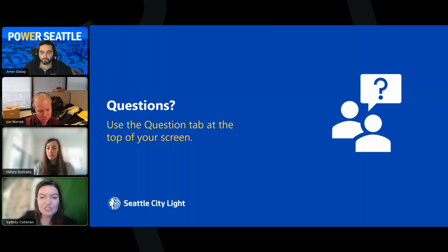And then I see Jesse's question, which was a clarification that we see lots of systems go through engineering review and we see lots fail. I'm not sure on the comment that engineering is rare. We're talking about residential systems under 25 kW with solar and storage. I think the clarification is likely from what I was sharing about the engineering studies, which are separate from a standard engineering review. So to your point, yes, all applications over 12 kilowatts would go through engineering review. What we were referring to with engineering studies being rare would be those additional studies such as impact, facilities, and feasibility studies. Those would be the rare instances.